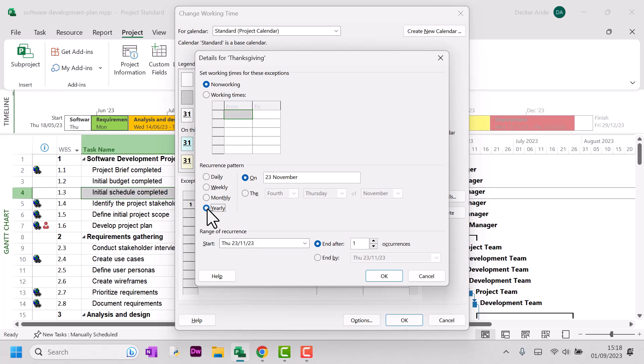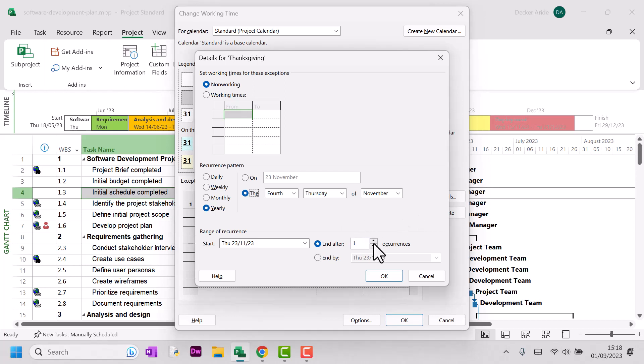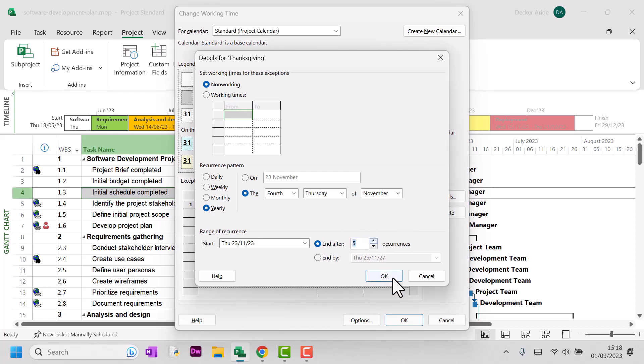Just click under details, select yearly, and then select that we want to recur this exception, this non-working time, on the 4th Thursday of November every year. And let's say we want to do that for five years. And then you can just click OK. Okay, so that's Thanksgiving done.